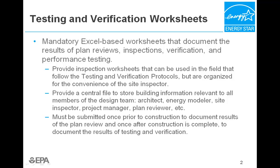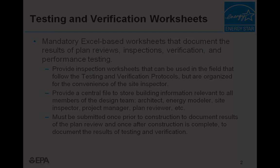They are submitted to the EPA both before and after construction. And now we'll jump right into the example worksheet file, which is available online, and walk you through step-by-step on how to use them and make the testing and verification process more efficient.